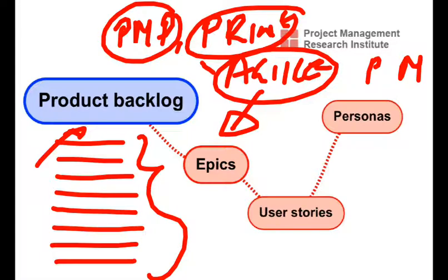And then if you take Scrum itself, which is just one flavor of Agile, I need to have a video on product backlog, another video on user stories, another video on estimation. So these epics are high level user stories which I am unable to estimate, and if I have to estimate them, I need to break them further into smaller user stories. So always we start with epics. You take a product, the product owner thinks about the major functionality it must do, and they are epics. And then these epics get broken down further into user stories. So it is a good practice to think about.